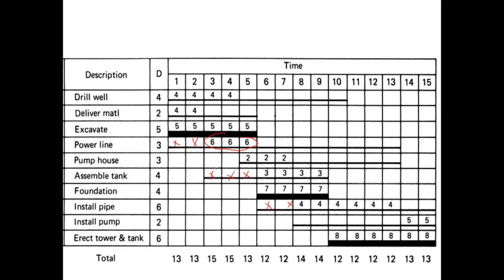Right, so the whole idea is this is just a tool to help you have a deep think to explore what are different optimization opportunities. So what you are suggesting is a possibility. Again, you will possibly have to discuss it with the subcontractors who are responsible for this. Your project would have certain constraints. For instance, your client may have specified that they definitely want the work done in a 15 day period. Now, if that is the case, that is your constraint, and you would not like to reduce the duration, because if you reduce the resources, that will double the amount of time.